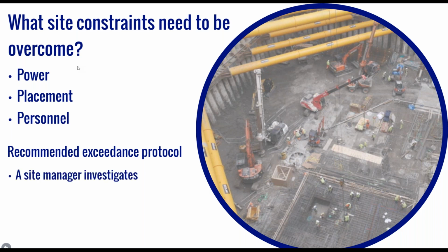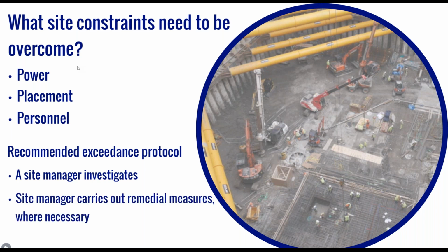Firstly, a site manager should investigate the cause of the exceedance, and if not a site manager, then an appointed person in their stead. Secondly, if construction related, then the manager or appointed person should ensure that the activity causing the alert is carried out in such a way as to minimize emissions and prevent further exceedances wherever practicable. And finally, the site manager or appointed person should inform the acoustician of the cause of the alert, who would then document it for reporting purposes where required. In our opinion, the above process and protocol effectively demonstrates best practicable means.